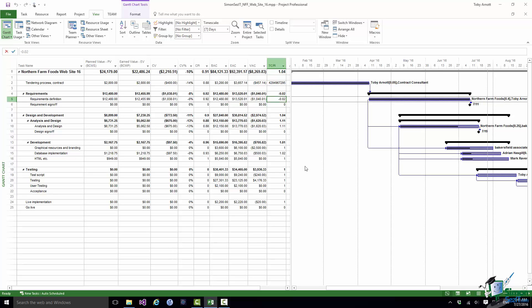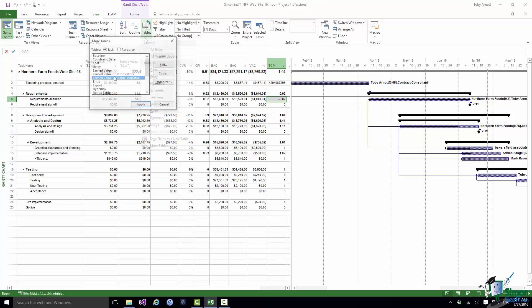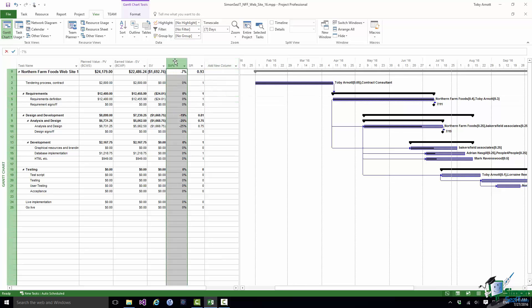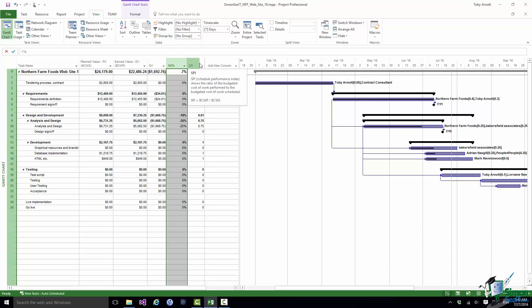Let's turn our attention to the third earned value table. That's the Schedule Indicators table. And the two columns there to point out are SV percent. So that's the schedule equivalent of CV percent. And again it gives you a good idea of the significance of the amount that you are behind or ahead of schedule. Here you can see we've got –25 percent which is clearly quite a bit. And then we have SPI which is the Schedule Performance Index.